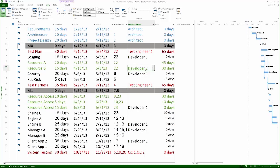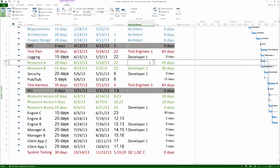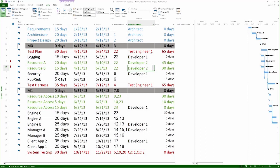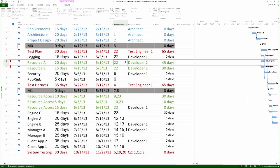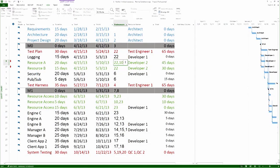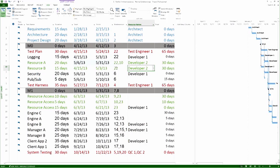Now, developer two could actually now go and do a nice activity. But suppose for task continuity, I want to give it a green task. If I want to give it a green task, and I would just give it the activity 9 over here, Microsoft Project is going to complain because the developer can't really do two activities at the same time. And on the left, you see an angry red man indicator saying that's not okay. The correct way of solving it is to move activity 9 down the timeline and consume its float. So, reduce it from 45 days to some other number. And so, what I'm going to do is I'm going to go to the predecessors here. I'm going to click here, F2. And I'm going to add dependency between 9 and 10.